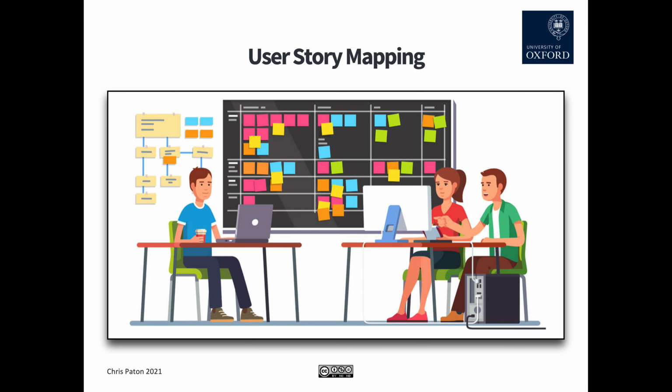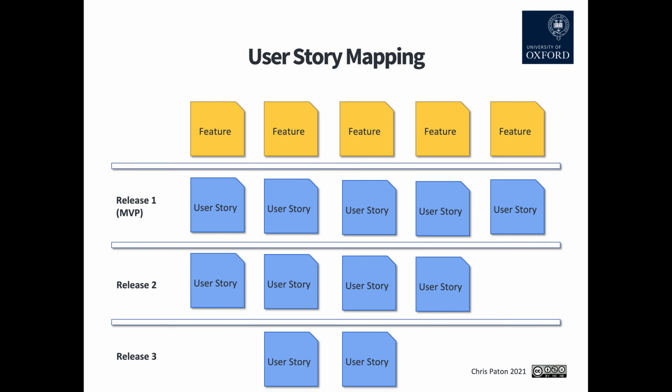And then you do a thing of user story mapping. So this is really taking stories of how they could use particular features of your system and how they're going to use those in their work or in the tasks that they've got to accomplish, and how your system can help them do that. And we do this through a workshopping process, and you can see on this picture you've got sticky notes on the background. So the designers and developers can then refer to these user stories as they're developing the system to make sure that what they're doing is really meeting the needs of the end users.